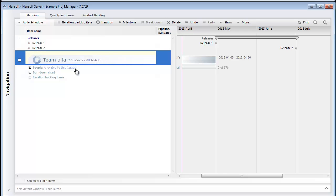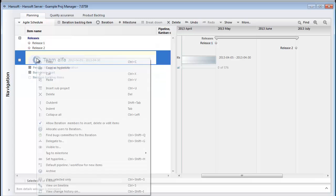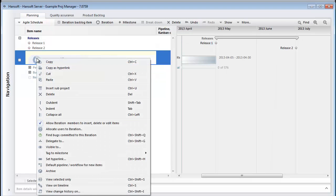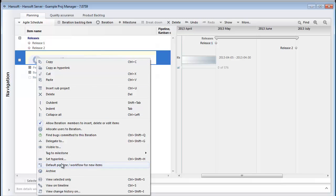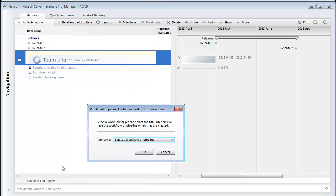If all the items this team will work on should go through this process we defined in our Kanban, I can automate so that all items committed to this iteration will get assigned to the Kanban. I can do that by just right clicking here and choosing Default Pipeline or Kanban for new items. I'll choose my Kanban called User Stories.